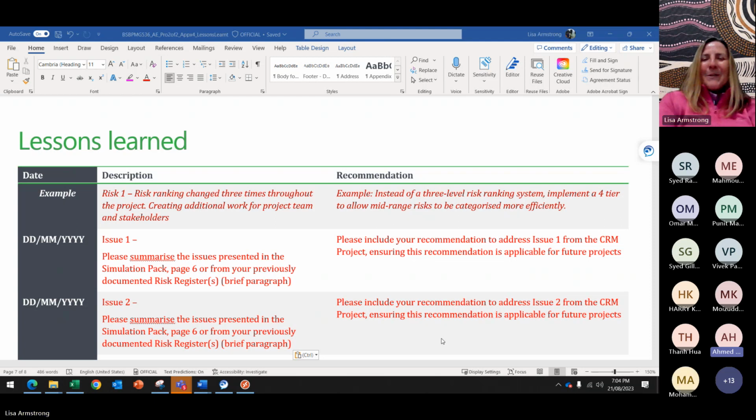Okay, so one of the risks that we have is delaying the delivery of the hardware for the CRM. Very good, that you identified the issue. And obviously that's due to the supply chain issue that we might have. So my recommendation, when signing the contract with the supplier, is to add a clause that if there are any delays there will be a financial penalty.